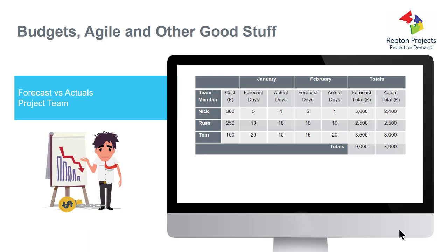But that's obviously only one view. It may be that we're behind schedule in terms of what we're trying to deliver. It might be that we're on schedule, in fact, in which case we're going to come in under budget. Or it might be some other factor associated with that. So you can't always tell from the raw numbers whether you're on track for your budget spend. All you can say is at this particular stage we're under budget, and you can then potentially reforecast to the end of the project as to whether you're coming under budget or whether you'll need to extend your budget.